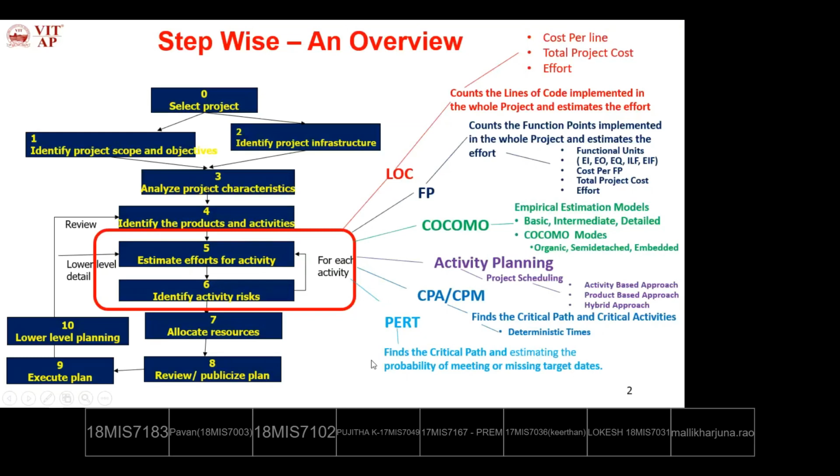So these two methodologies, PERT and CPM, are used to identify the various critical tasks and critical activities that exist in the project development. Here every activity has some time intervals. Those are divided into three types in terms of non-deterministic time intervals: optimistic, most likely, and pessimistic.